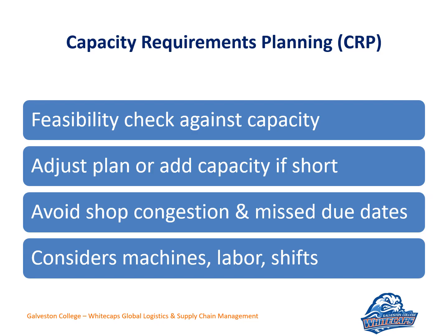What they're supposed to do is ensure that what MRP intends to build can be built with the resources, which include tools, people, and materials. So when it's planned, the capacity requirements plan has to make sure that it's achievable.